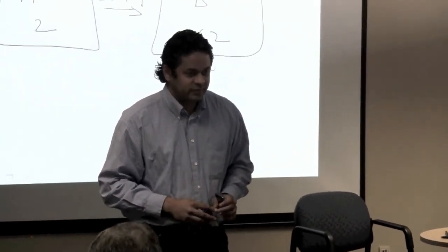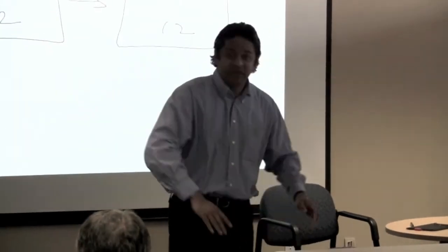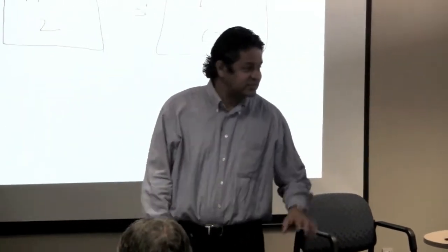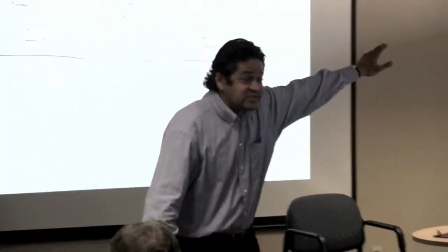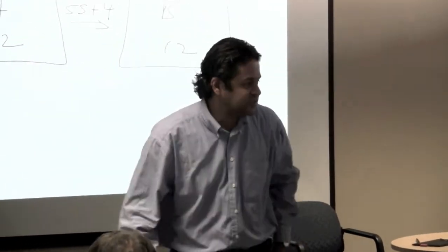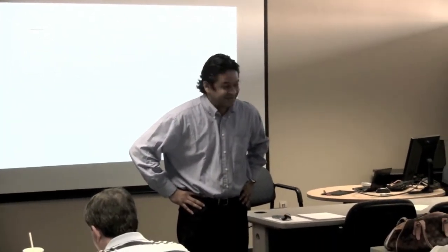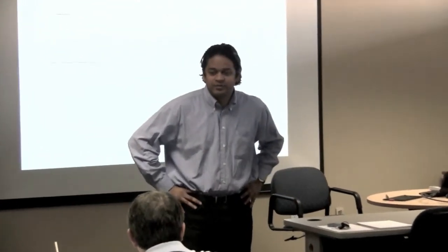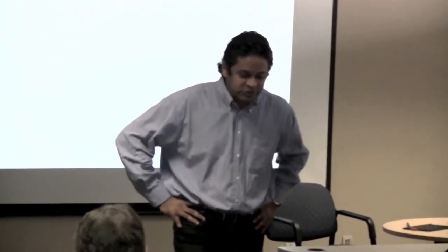There's another question you're going to get. What if there's a difference of opinion between all your stakeholders? The team members are saying one thing, the activity owners are saying something else, the sponsor is saying something else, and the customer is saying something else. Now what do you do? The answer would be, always resolve the matter in favor of the customer. Whenever there's a difference of opinion between all stakeholders, always resolve the matter in favor of the customer.